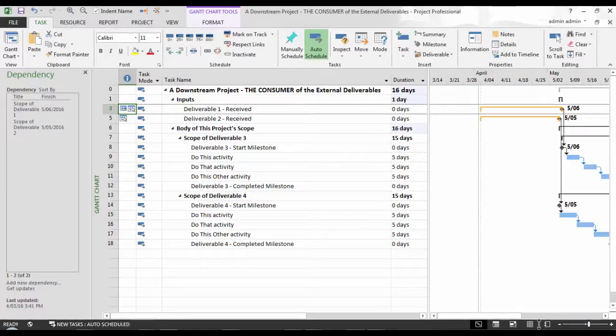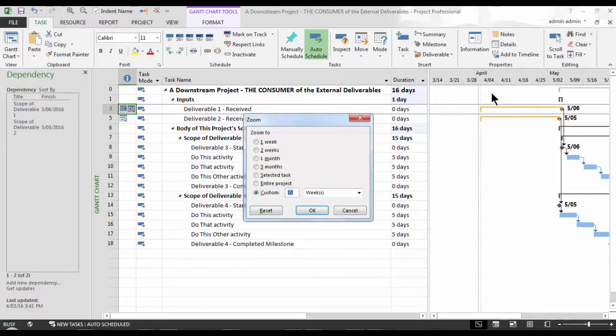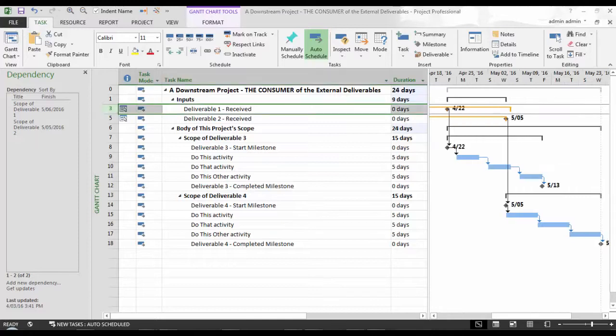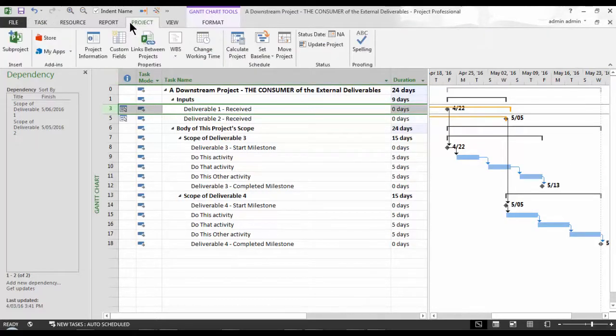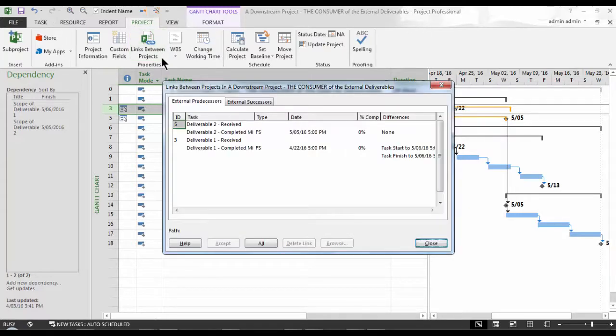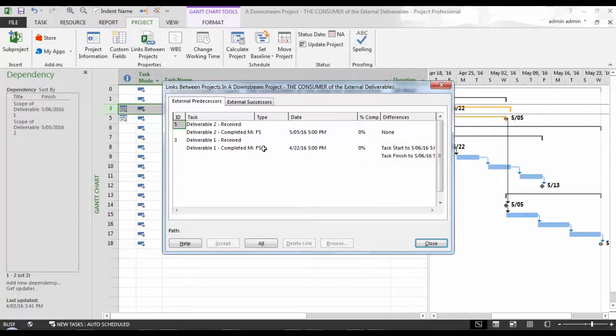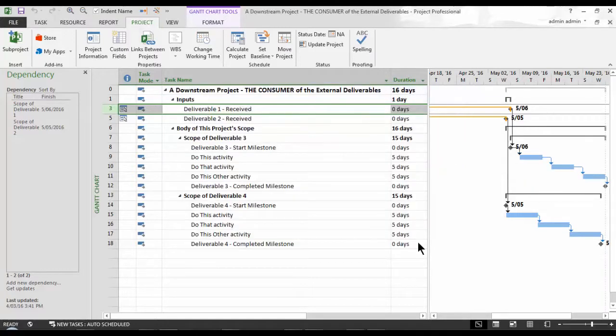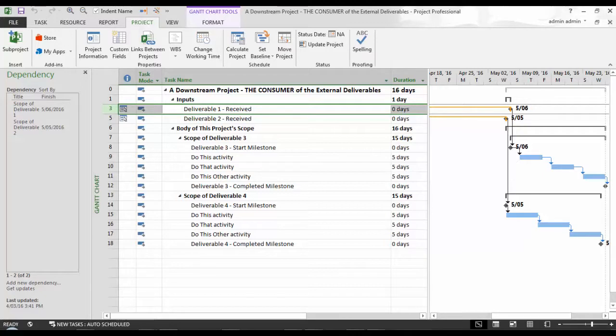We could just move the milestone manually to align it accordingly to May 6th, but don't do that either. Let me zoom out and undo the constraint I just set manually. The way to do it is to leverage the Link to Projects dialog window here and now. Notice that it displays a change in waiting. Given our formal confirmation notification about the date change of our deliverable from the upstream producer project, we will proceed to select our deliverable from this window and click Accept to the change. Doing so renders the appropriate results. Notice the milestone has been moved for us, having the hard external dependency acting accordingly and on our queue. This is how one should go about using this solution to tame and control projects.